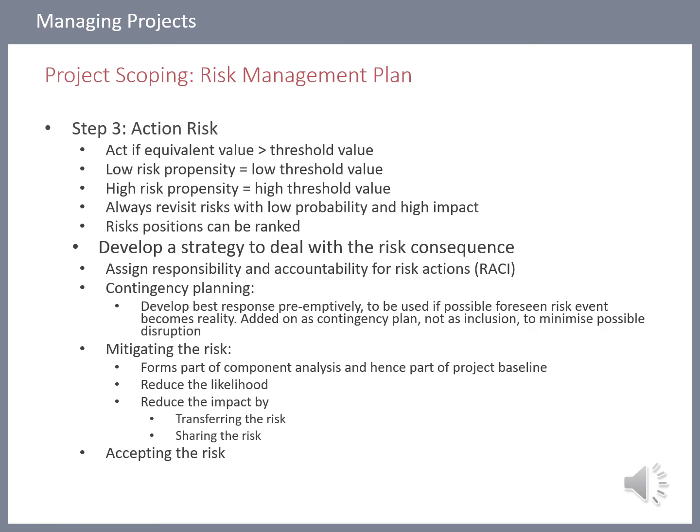If the risk becomes bigger, you'll have a mitigation plan in place. And a mitigation plan means a plan A. So you get something in place so that you are reducing the risk by already actioning the risk. And then if the risk is really too big, you will say, I'm not going to accept the risk. I'm going to pass this on, and I'm going to either reduce the component in my project, or I'll let management decide, because these are devastating stuff. These are really big bad stuff that can happen to our projects.